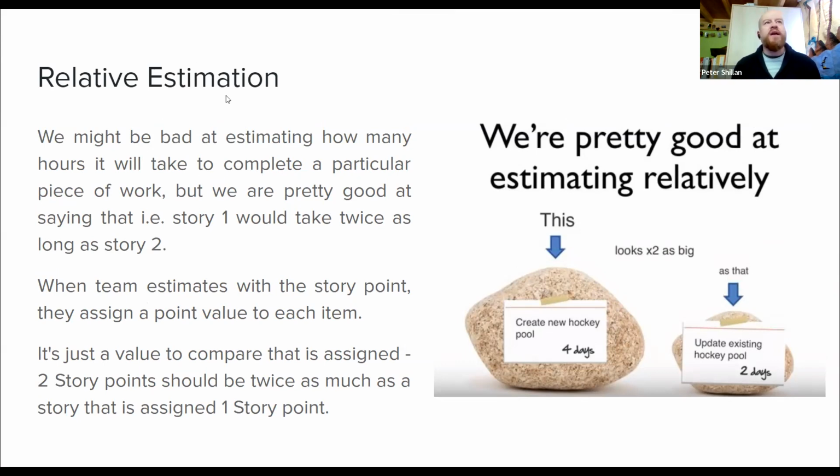which I think generally work a lot better than saying what's going to take me so many days, because all sorts of things can interfere with time-based estimation, like whether some environment's available or whether there's other things going on that are outside of the control of the team. So relative estimation is just focused on what you can do within the team.